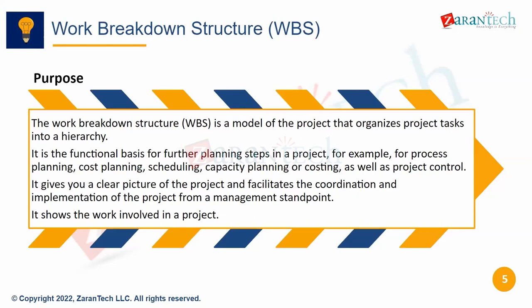Let's say I'm taking construction, then I need to first do the brickwork. I need to make the wall. Then I need to do the plastering. Maybe I'll have to wait one week after the plaster is over for it to dry. Then only I can do painting. Within painting, if I need to do 2-3 coats, how much will the first coat take, then the second coat, how many days it will take, and so on. So that is in activities, that is the process planning in this case.